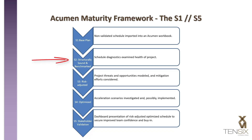S2: the schedule quality inspection and schedule modification iterative process are implemented. In the S2 phase you can also benchmark your schedule — that is, compare your schedule to an Acumen cloud database of actual similar schedules rated by their quality and potential for success.